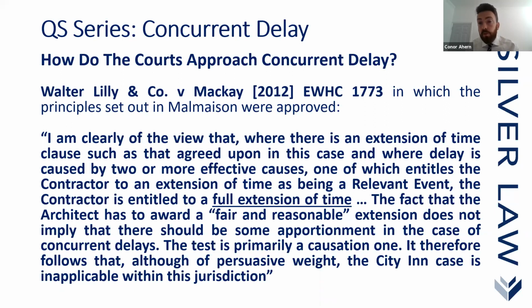He basically rejects the approach in City Inn and the option to apportion risk between the parties. What he's saying is that there needs to be more certainty than that, and certainty in his mind comes from the fact that if a relevant event occurs and it delays the overall completion date, then the contractor is entitled to a full extension of time.